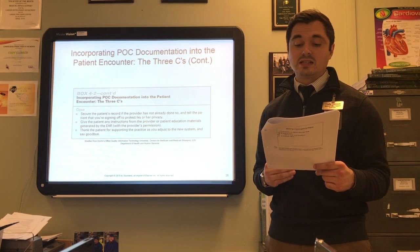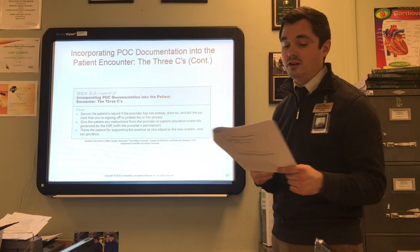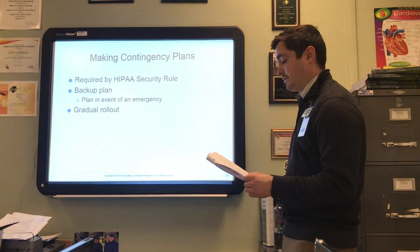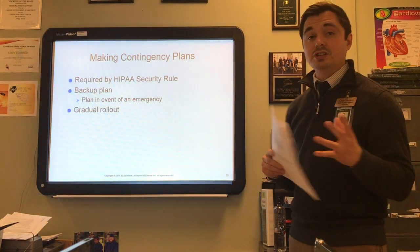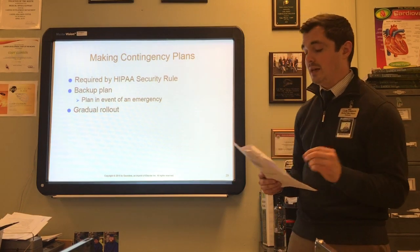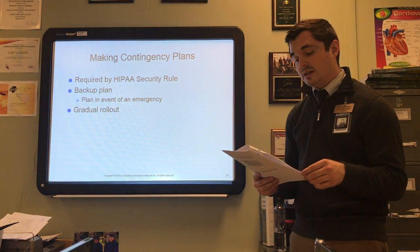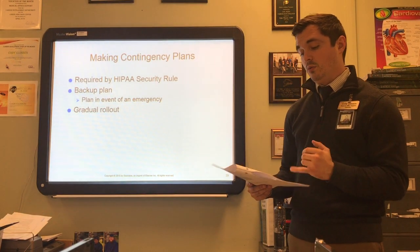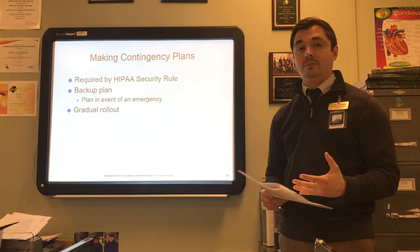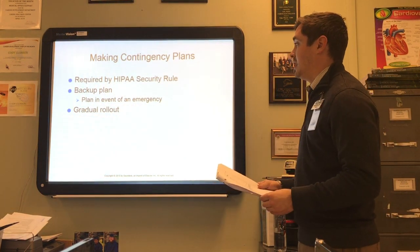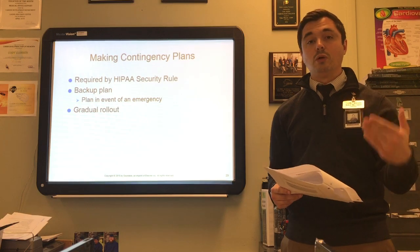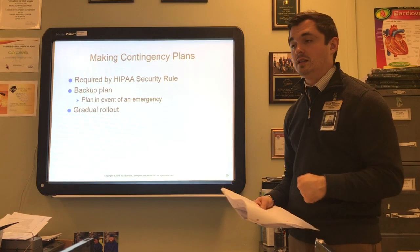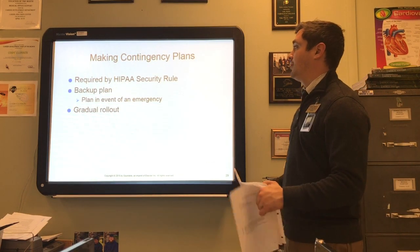Making contingency plans is required by the HIPAA Security Rule, which requires that patient health information be protected from disasters of all sorts, including system crashes that may occur when a new system is launched. It's important to have a backup plan in the event of an emergency. When implementing the system, there should be a gradual rollout — don't go all at once — to help with the implementation.